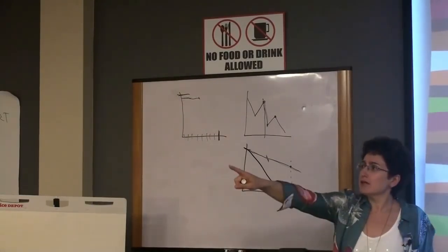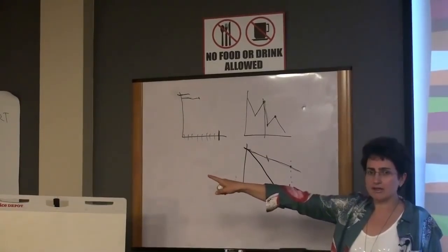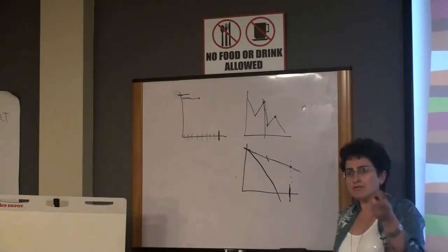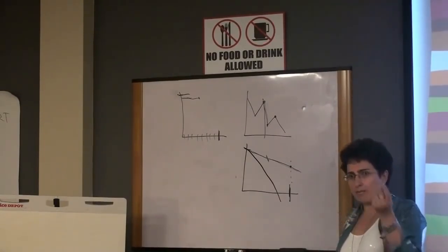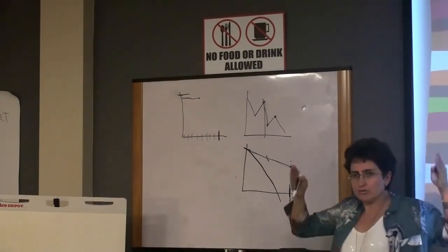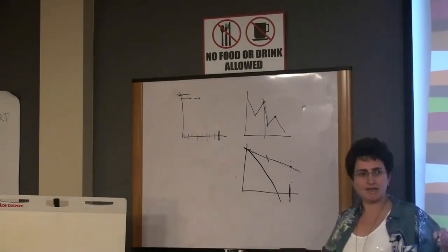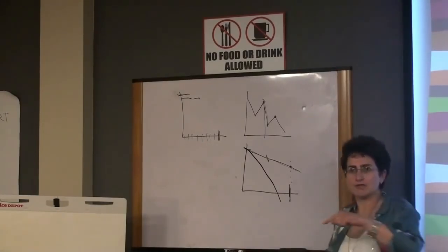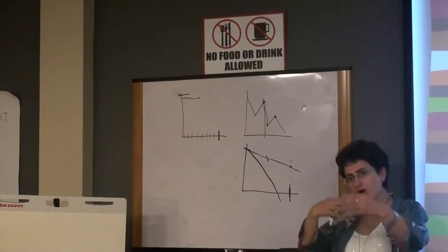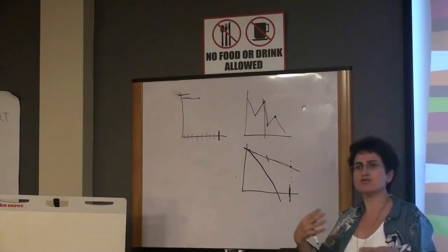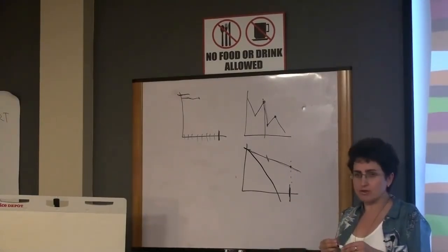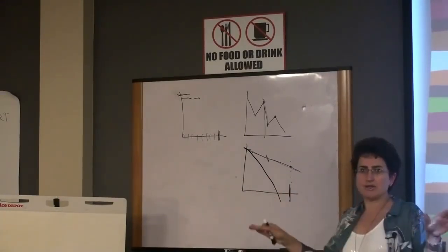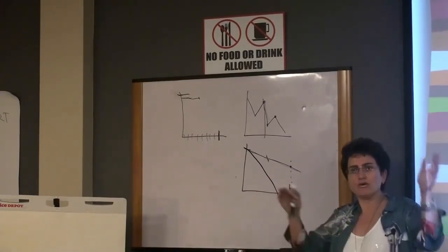You have the product backlog outlined. You plan again, and you start the process all over again. Even if you want to add or remove a couple of features, you cannot do it within the sprint. That's the whole idea. Because if people come to you and say, okay, now drop this, develop this, when you've already started, then the churn on the development and tester side is too much, and people will not be able to deliver. So once the sprint is defined in scope, it's written in stone. You either do it or you don't do it.